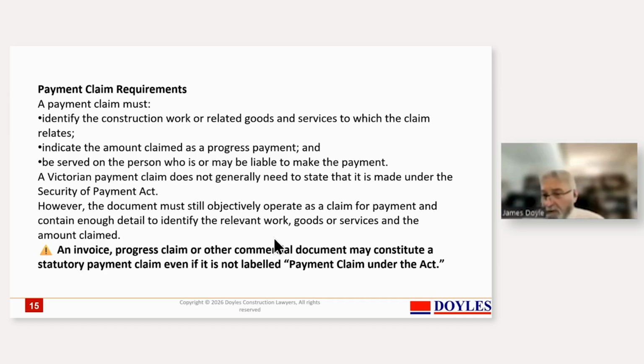And you've got to look ahead in how you're indicating what you're claiming for to an adjudication, because if an adjudicator's got to value the concrete work you've done in the last 3 months, you've got to give him as much assistance as you can. So if you don't specify it in the claim, you may find it pretty awkward to then try and identify what it was you're claiming for.